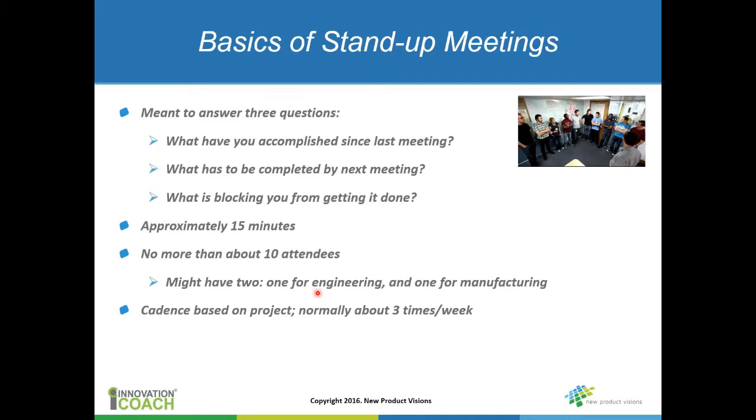The cadence, how often you do these, is really going to be based on the project. Normally it might be 3 times a week, which probably seems right, but it may be that at the beginning of the project it's not 3 times, maybe it's once a week, maybe it's not even started until after some time as the project starts to unfold. As you get closer to the end of the project, it might have to be done daily.